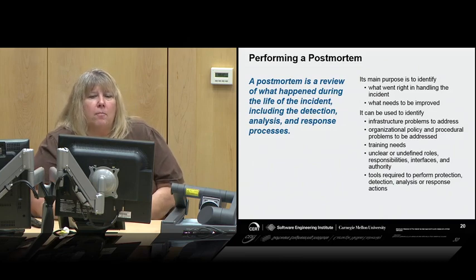So again, the main purpose of the postmortem is to understand what went right, but also to understand and identify what could be improved, and is there a path forward? Is there funding for the improvements? Is there authority to put the improvements in place? And is there buy-in from the staff that will be affected by any changes?